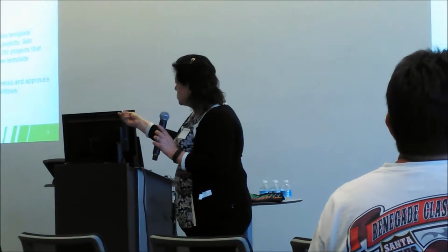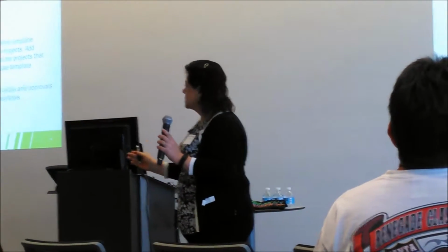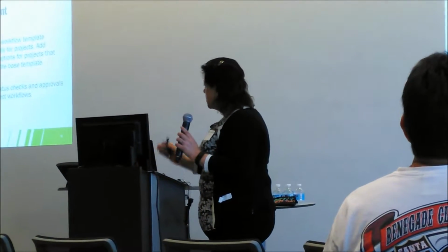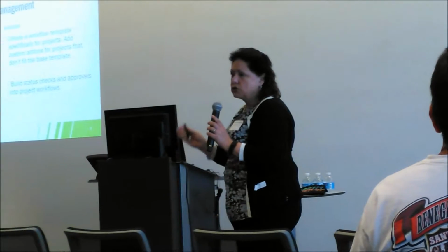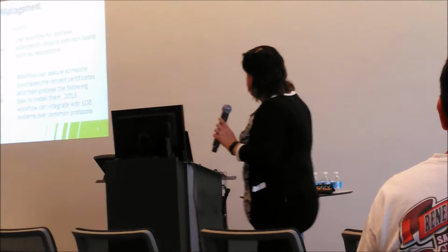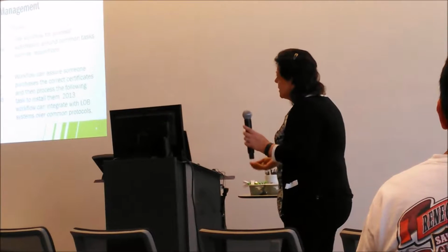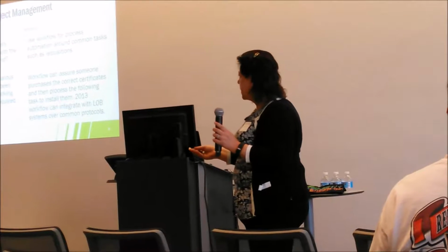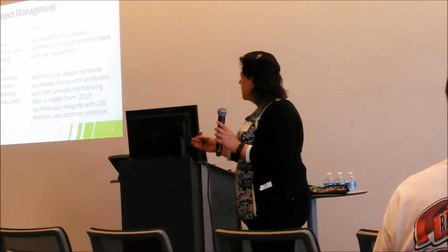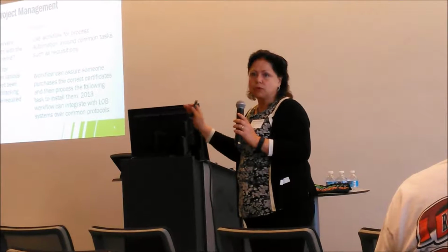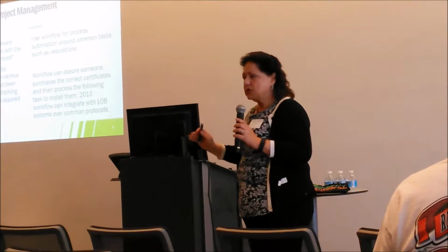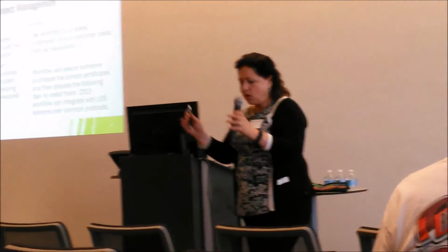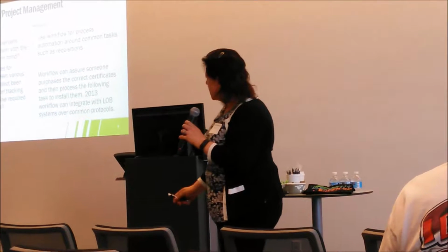Let's say also that your team has drafted a checklist. You want to avoid roadblocks, last-minute emergencies that are going to stop that project in its tracks. So you can build in status checks, approvals. Your timeline can be monitored by your workflow. So let's say in this IT project you need additional servers. You have to request them. There has to be lead time. The workflow can have branches that handle the requisitions, make sure that the right equipment is there in time. It's a good way to gather a large group of people who don't see each other every day and have them all actively participating in the same project.